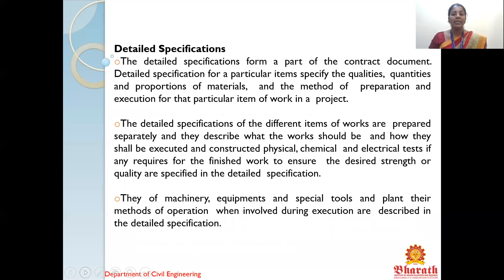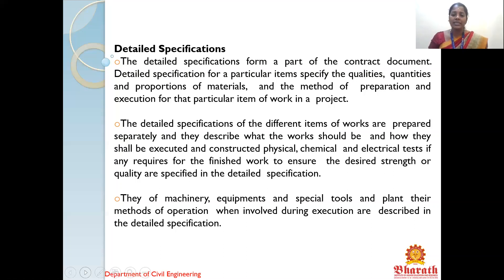In detailed specification, which forms part of the contract document, the quality, quantities, and proportion of materials, and the method of preparation and execution for a particular item of work in a project are specified. For example, for foundation alone, how much quantity of materials, what equipment will be used, how many laborers will be engaged — material description, labor description, equipment description, budgeting, scheduling, and time duration — everything in detail will be discussed in the detailed specification.